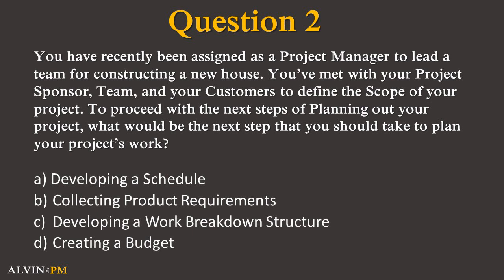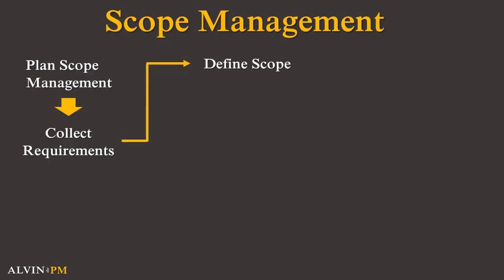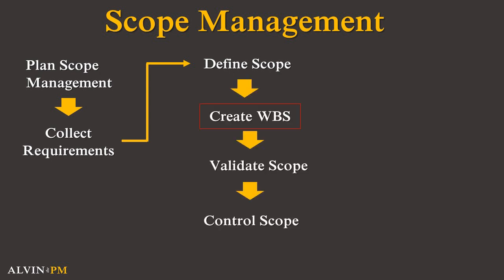Pause the video and write down which answer choice you think is correct. If you chose C, then you are correct. Once you have collaborated with your team to define the scope of your project, you have already defined the requirements of both your project and the desired final product. Therefore, the next step would be to develop a work breakdown structure so you can break down your project's work into much more manageable deliverables.